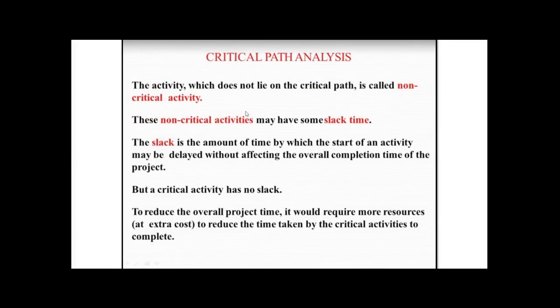The other activities aside from the critical path activities are called non-critical activities. And in these non-critical activities, we have the so-called slack time. Slack is the amount of time by which the start of an activity may be delayed without affecting the duration of the entire project. And take note that the critical activity has no slack.